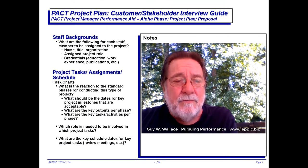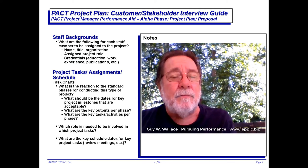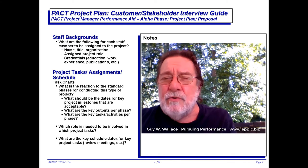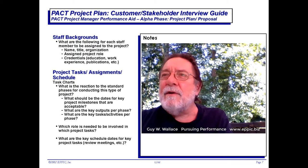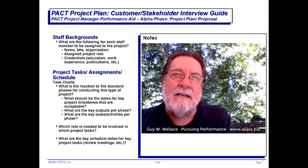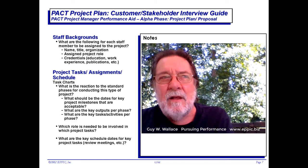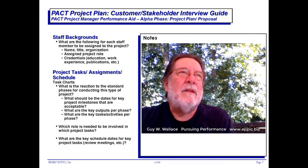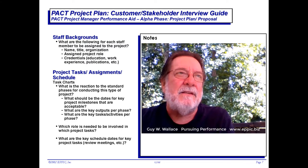The next page covers staff backgrounds, project task assignments, and schedules. The stakeholders on the supply side include the L&D organization — training and development, ISD, or LXD. Who's going to be doing what, and what kind of backgrounds do they have? Are they rookies on their first solo outing, or are they seasoned veterans? We need to know that when crafting a project plan because a seasoned veteran takes less time and fewer iterations than a rookie.